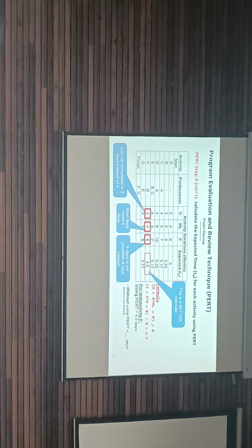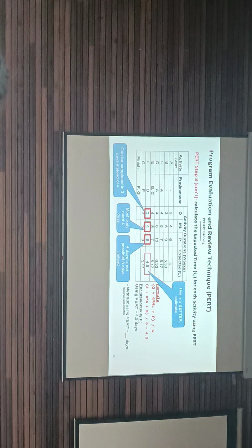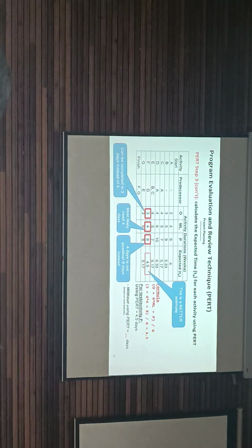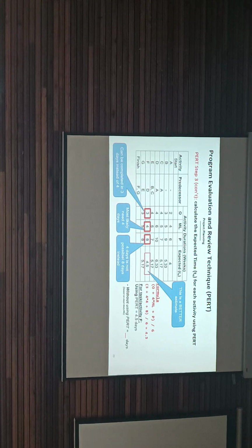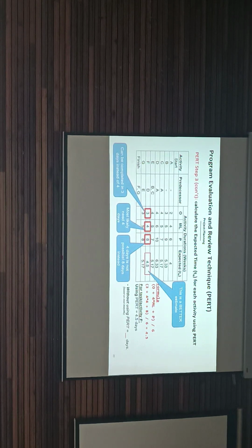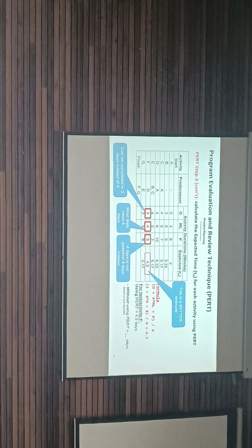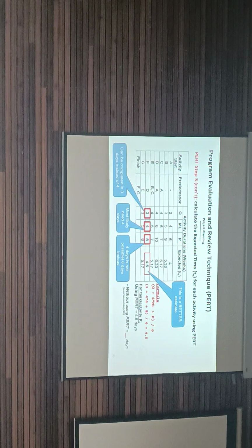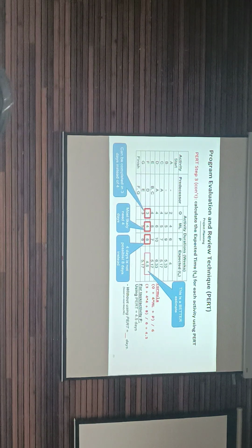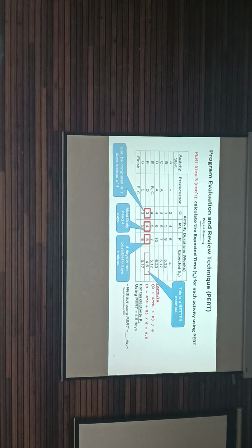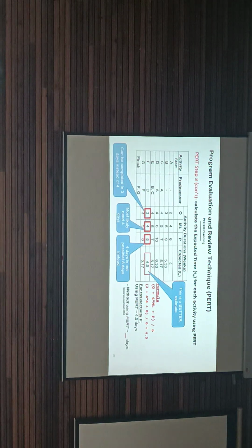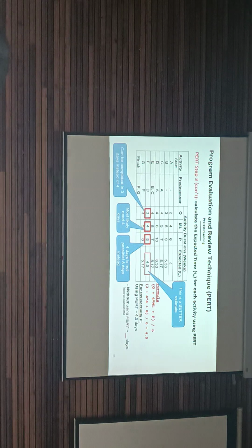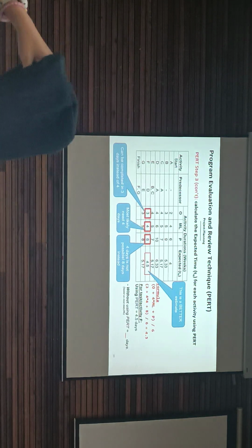Okay, or it can be in the meeting. In the meeting, I'm the project manager. I have 3 team members, 1, 2, 3. So I ask, what's the best estimate to complete this task? One tells me 3, one tells me 4, one tells me 8. So I take their considerations into account to come up with an agreeable estimate, which is 4.5.